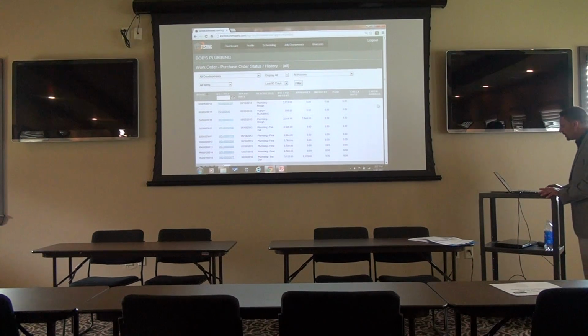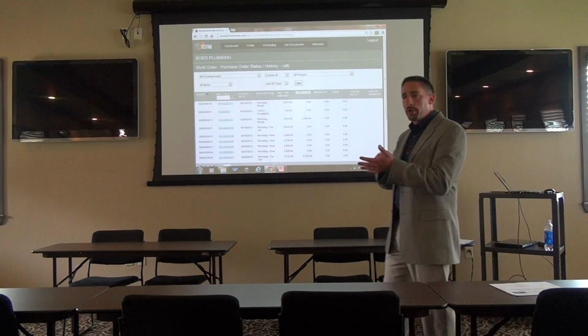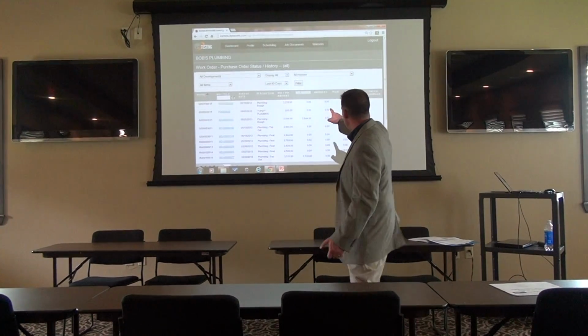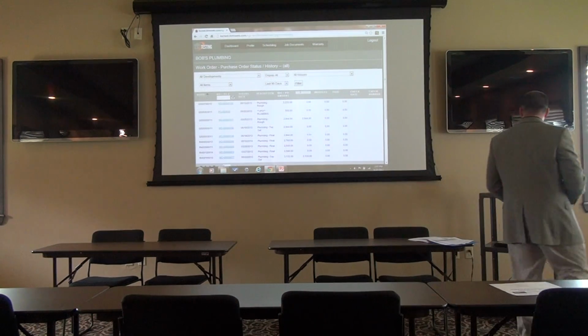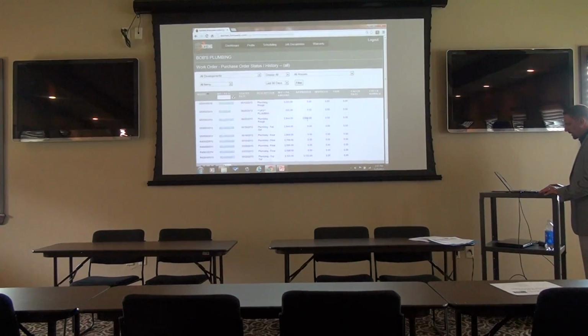Now there's some other really important columns on here. There's the day that the superintendent, who walks the job site with a tablet, approves the work. Okay, so when they do that, that action puts it into the approved column. So that 2944 for rough plumbing, that means that the superintendent walked to this job site, looked at this work order, and said, yes, that work is complete. That moved it to this column.